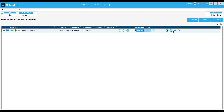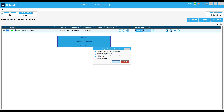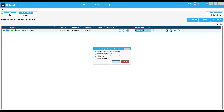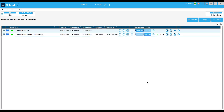I'll go ahead and do a copy and insert of the scenario, check all the boxes, and then rename it 'original contract plus change orders' and save it.